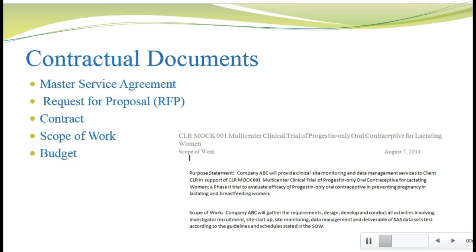Let's talk about the master agreement. If a sponsor plans to work frequently with a vendor, they may negotiate a master agreement that outlines the general expectations that will be in place for all projects the two work on. For example, the master agreement might say the sponsor requires records be retained for five years — that would be a requirement for any study the sponsor does with you. The individual project contracts could refer to the master agreement. I've included a link to the master agreement between Wyeth Pharmaceuticals and the University of Texas; you don't have to read this in depth, but scan it to get a feel for what a master agreement looks like.